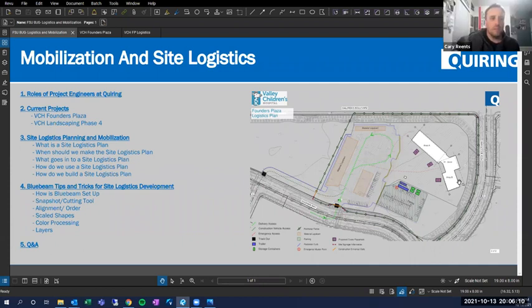Yeah, no, for sure. I think I see it down here in your Bluebeam tips, but I was going to mention, the idea of a site logistics plan like this is to try not to change the permanent elements. So if you have to put power poles on a job to bring temporary power to your build, you obviously don't want to put that pole somewhere where you're going to have to pave a parking lot in 6 months.